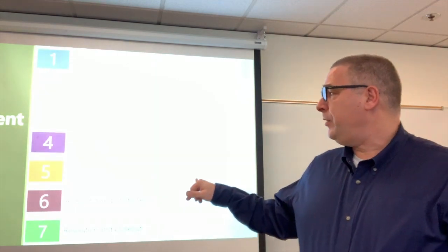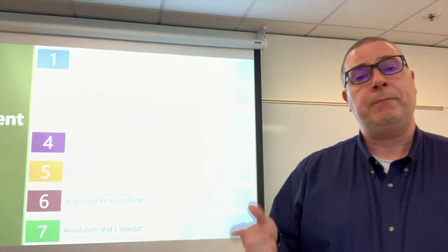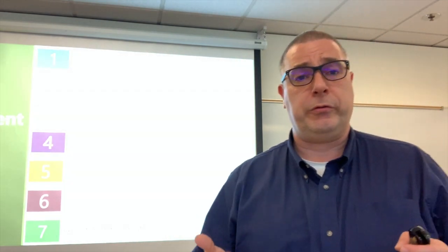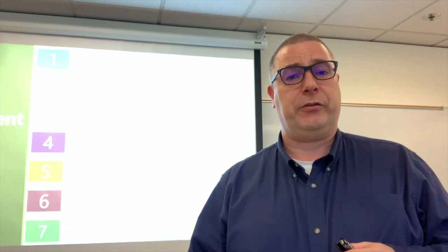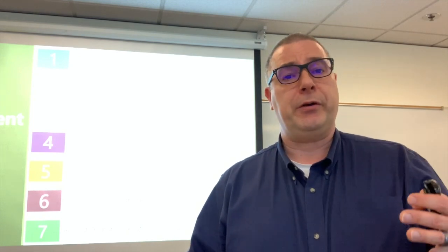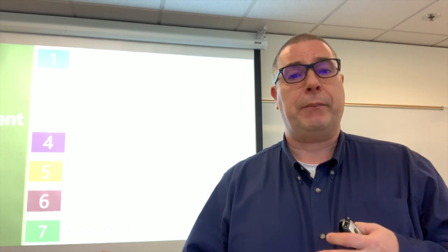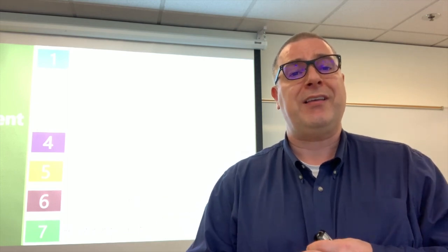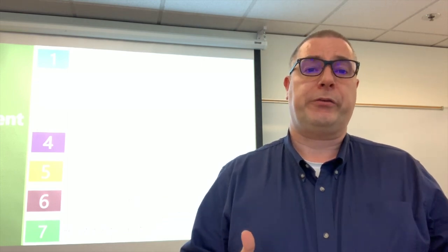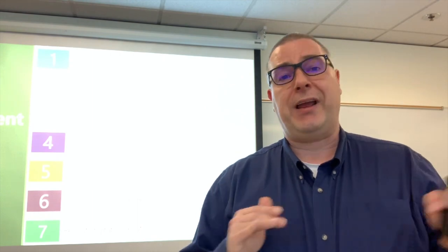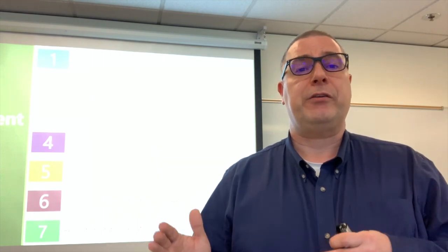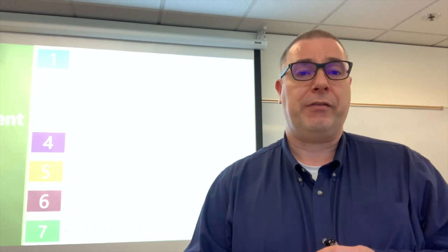Then you're going to say the roles and responsibilities, right? From a roles and responsibilities perspective, who's responsible in helping you solve these issues? Do you bring your customers in? Do you bring your management in? Your team members? Who's involved in that process? And so you're going to document that in the roles and responsibilities, making sure that everyone understands exactly who's involved in this process.